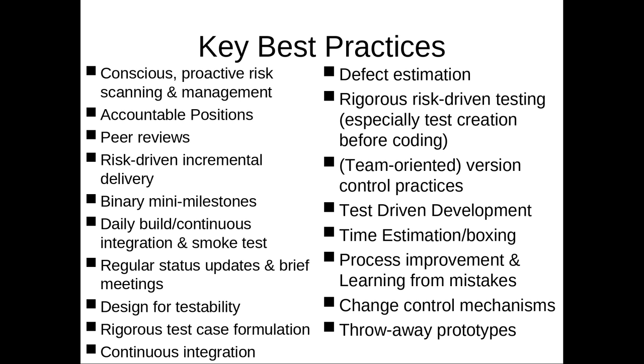Conscious, proactive risk scanning and management. Speak to me, Hughes. What is meant by risk scanning? Yes, Pat. I think it's when you keep track of all the risks, both ongoing and new. Yes. And manage them. That's right. So you're scanning for risks that were identified earlier, and you want to see if they're coming about. Like, there may be a danger that someone's burning out, or maybe that person is out of touch for a while, maybe they're going to drop the course.